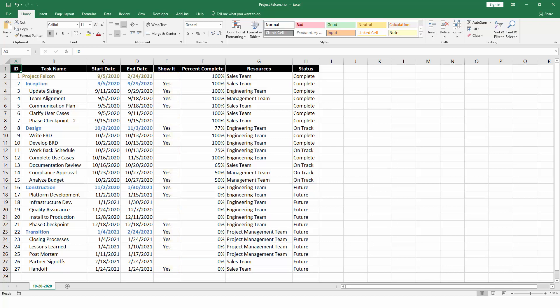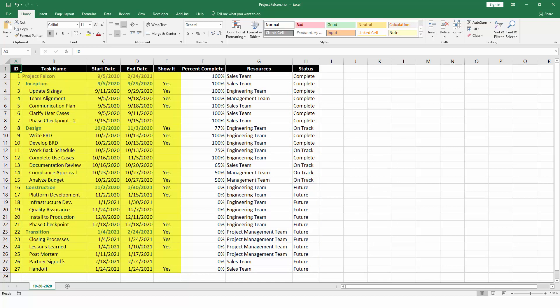If you want to create a more complex project schedule, you can always add more fields to your Excel file to track things like progress, status, resource assignments, or budget information. The five fields discussed earlier are really the minimum for what you need for a basic project plan. OnePager doesn't care about the exact name of these fields or what order they're in. As long as you have something close in your spreadsheet, you'll be in good shape.